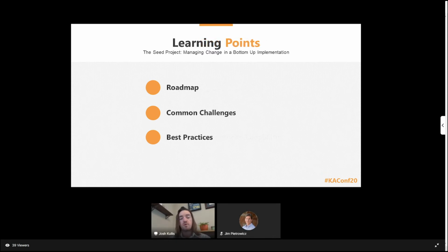So to recap, we went through the roadmap. We have the 7 steps. We go briefing, scoping session. We then do a seed project. We take that seed project, we transition it into production. And then essentially we take those 4 steps, we repeat them for the adjacent development so that we can increase the awareness. As we start to increase the awareness, we then get to the point where we have demand-driven growth, which ultimately ends up in the enterprise capability.